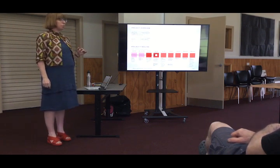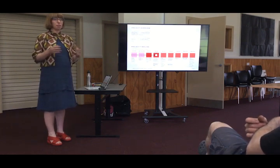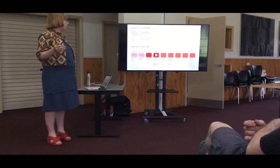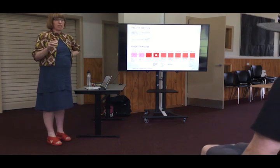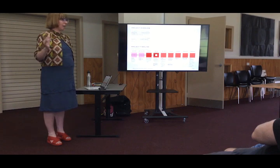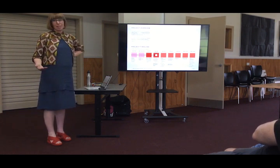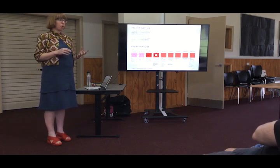Then we'll have another session of community consultation, so we're aiming for that to be about late February or so, depending on how the project goes and what feedback we get today and throughout this phase of consultation. And then from there we'll have yet another community session, go into a round of approvals, and then go into more of a detailed design approach for the two precincts. So all that, we're looking at trying to get things done by the end of March, but that may extend out to April or so. But we're on board to make this an effective process, so I think we can really key into the capital works program as soon as possible.